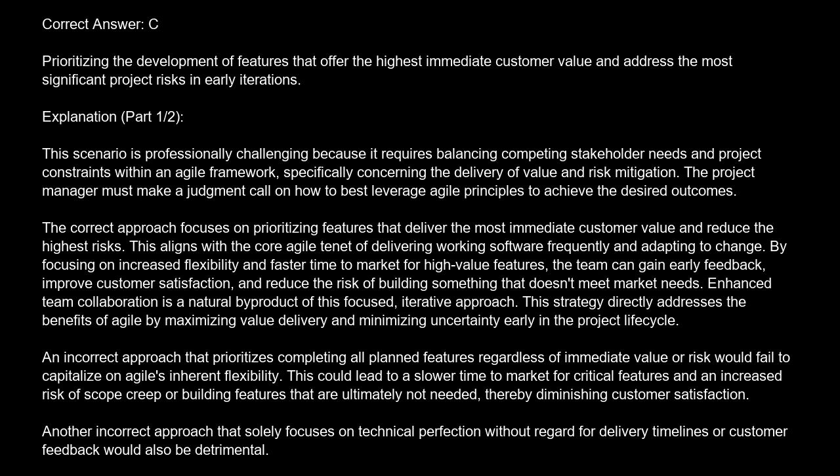The project manager must make a judgment call on how to best leverage Agile principles to achieve the desired outcomes. The correct approach focuses on prioritizing features that deliver the most immediate customer value and reduce the highest risks. This aligns with the core Agile tenet of delivering working software frequently and adapting to change.